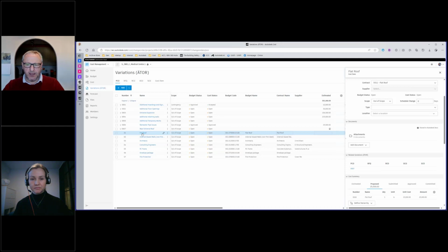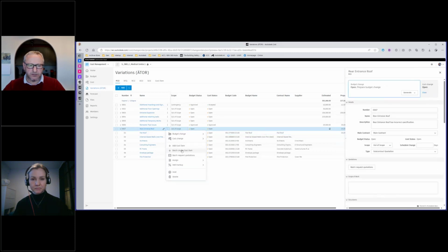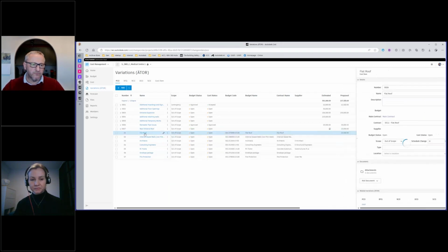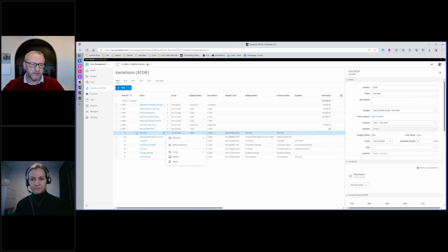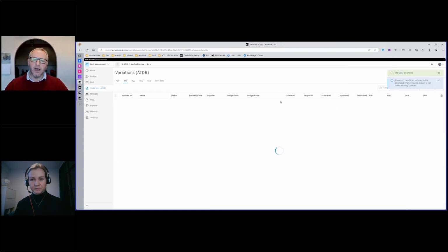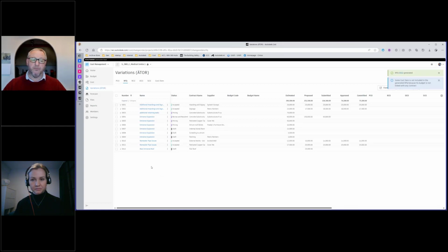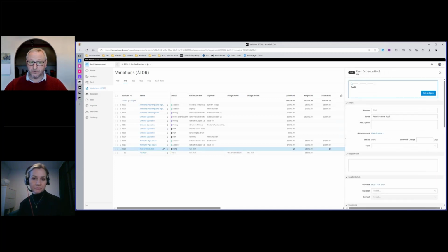I'm also going to want to request a quote. So I'm just going to pick one of these, although I can batch request. So I've got a batch request quotes here. That will just give me a batch request on all of these. I'm just going to simply select one. In here, this single item, I'm going to generate an RFQ, a request for quote. I would like a subcontractor. It might be a new subcontractor. It might be an existing subcontractor. I would like them to bid on this work.